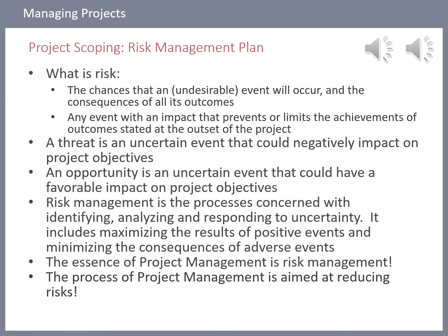And if you say impact, you always ask the question, impact on what? Now remember the three components of a project or a project plan. It is the what or the scope, it is the when or the schedule, it is the how much or the cost. So when you talk about impact in projects, you talk about the impact on one of those three components.